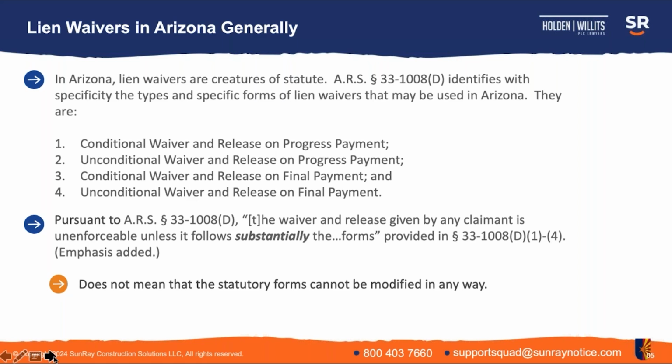Lien waivers, as you'll see throughout the course of today's presentation, are documents that are used very frequently in the construction process. Most folks familiar with the industry recognize that the typical process when you're submitting a payment application or an invoice is to provide a conditional waiver for the payment you're seeking, and if you're still in the progress payment phase, then provide an unconditional for the last payment that you received.